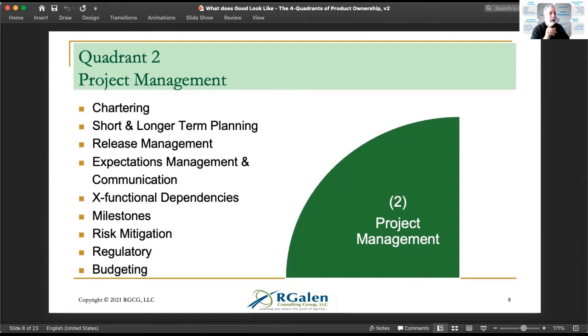Another part of that is product owners working together when you're doing larger scale products. I always feel like product owners have a responsibility when they take a large backlog and split it into team level backlogs to be thoughtful about the dependencies between the teams. So creating simplified dependency maps starts with product owners working together and being thoughtful. It's not just dump it to the teams and say, well, they need to sort out the dependencies. There's thoughtful decoupling, and product owners can do a great job of pre-decoupling dependencies for the team.